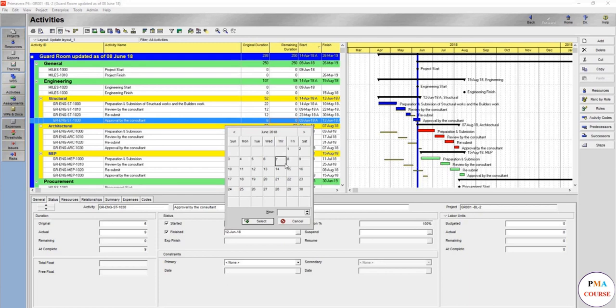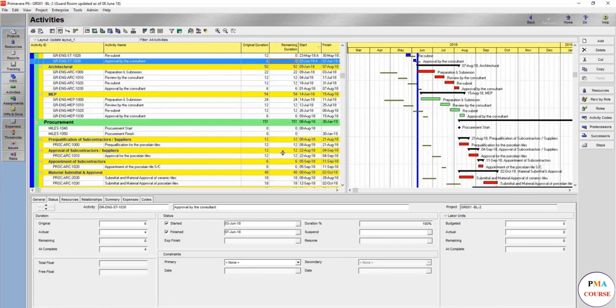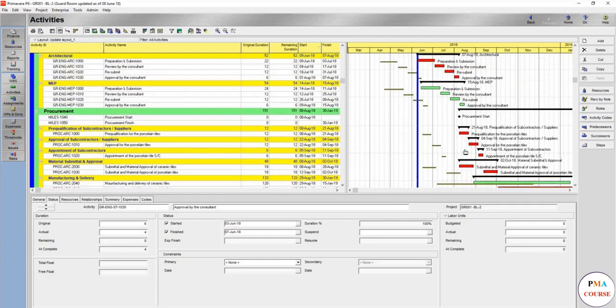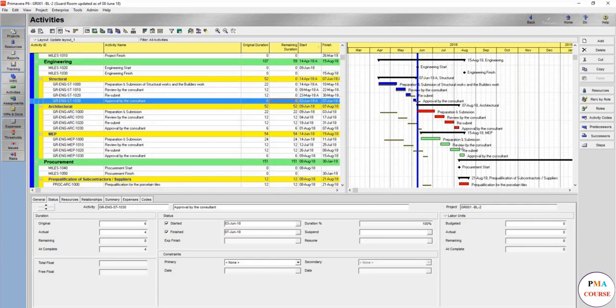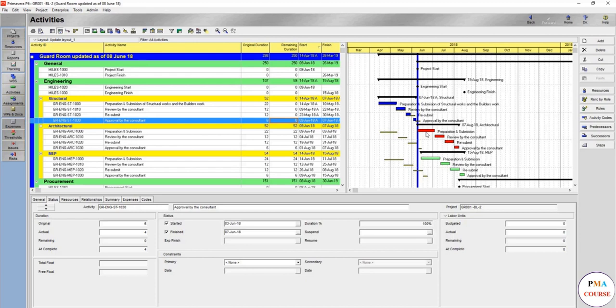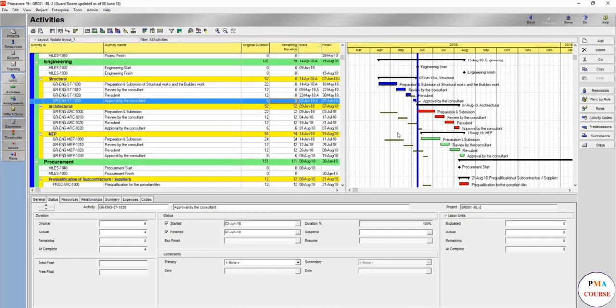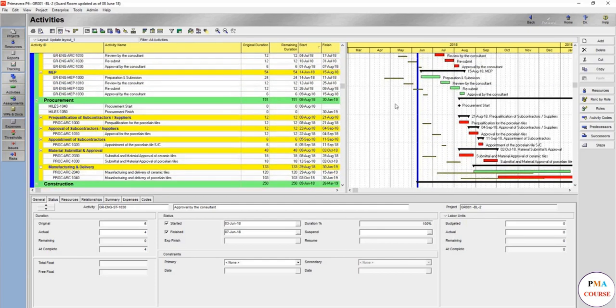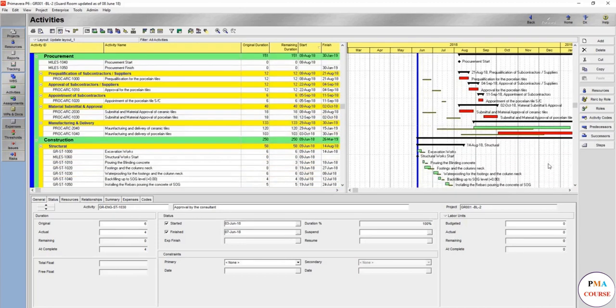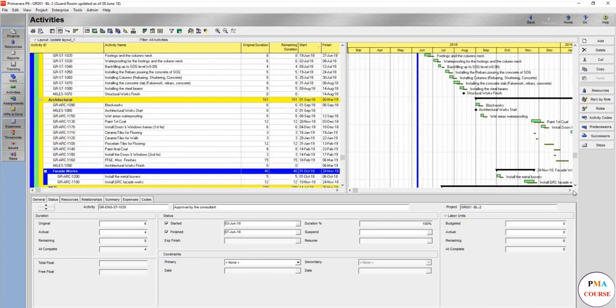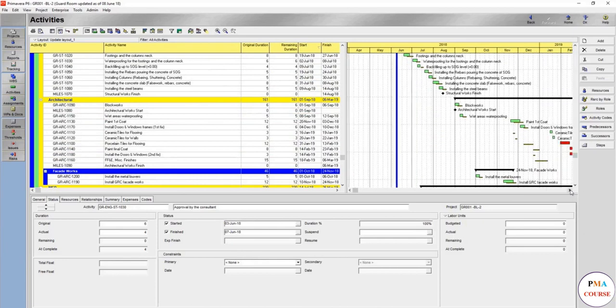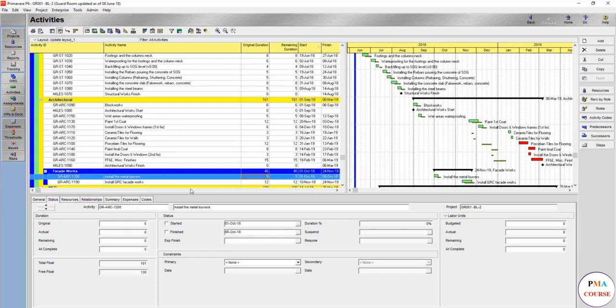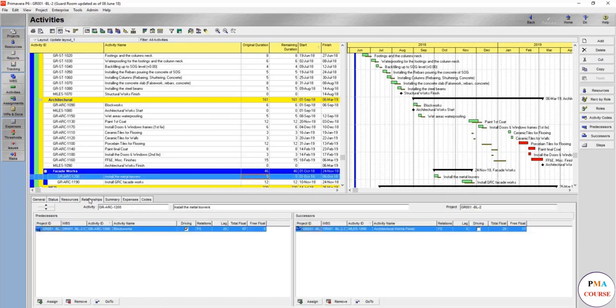We can correct this by moving it to 3 June and 8 June. I wanted to do this only to make sure that we can update some of the construction as well. The good thing here, as you see, this works fine and this shows that's clearly late. It was supposed to finish here but it is going to start here. That's why the use of these bars as well. It will give you a good comparison what's going on. You are going to see exactly that the project is slipping.